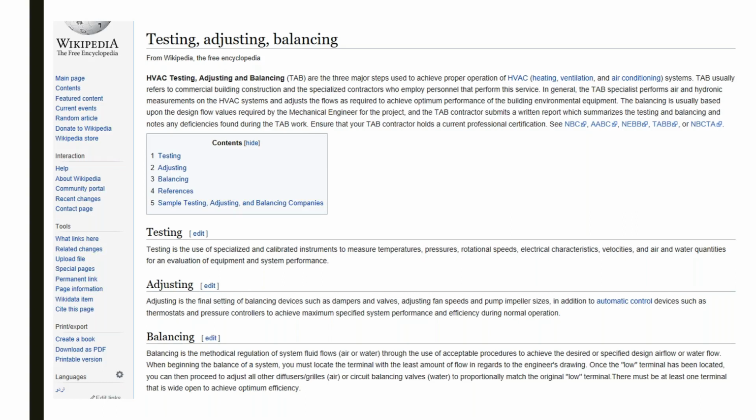They had to go back to the engineer and ask the engineer to fix this. Well, this place is almost finished, and you're asking somebody to repipe the entire system because the flow is too low. And it was a bad deal. I mean, sure enough, they could not occupy part of the building for a year because of this, while they tried to figure out what the correction was. And so this is where things like that come up. That was a good tab firm, but nobody read the report.